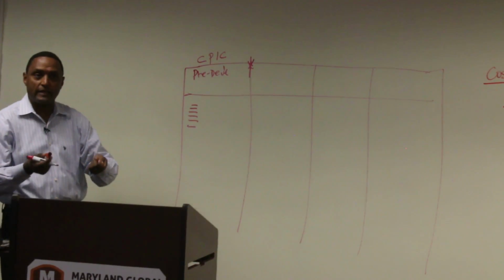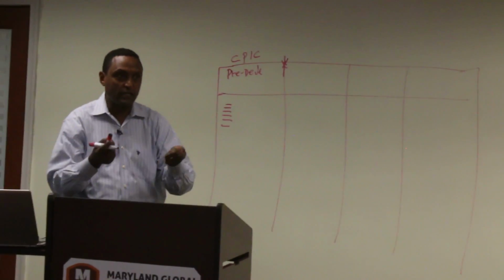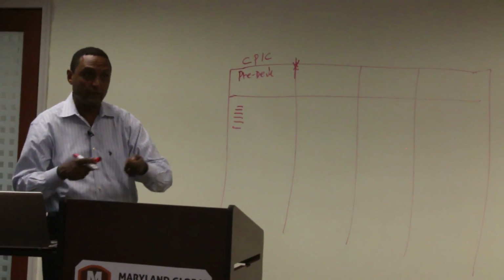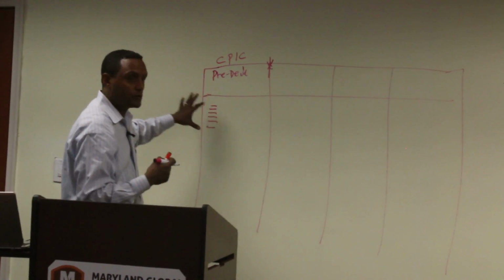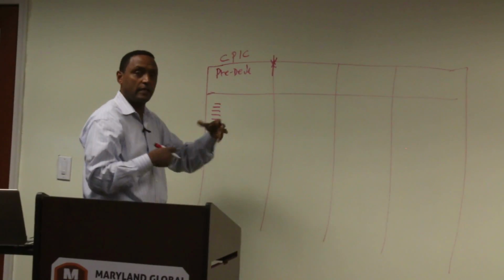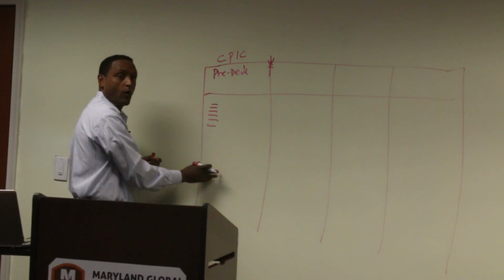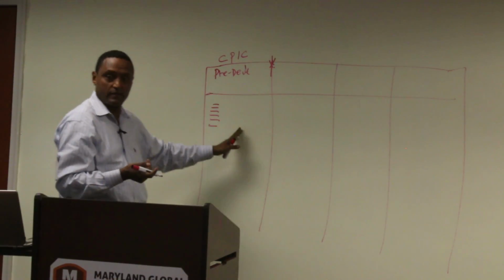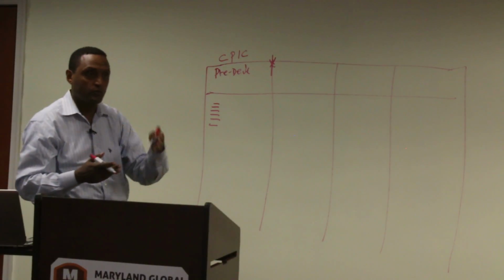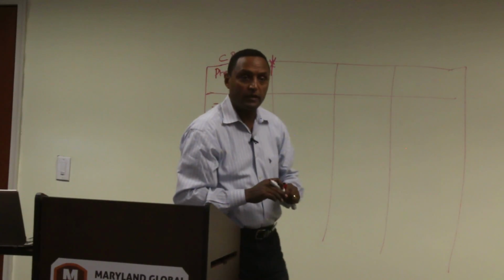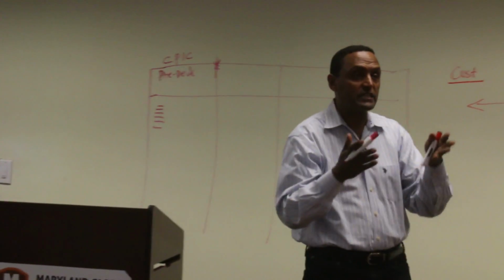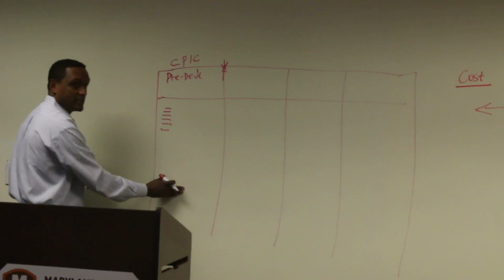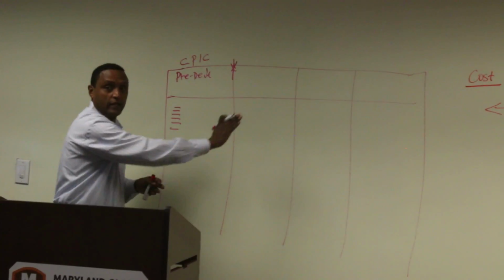You submit your design, you get your design review, you adjust that design, and it goes back. You also pick your contractors, compare them, and publish your RFI, and then they come back. The whole activity is going on at this stage. In the IT world, it's the same thing. You do alternative analysis, which we're going to discuss, and then you do some of the feasibility studies. You do a business case analysis. All of this is done in the pre-development phase before you officially move to the next one.